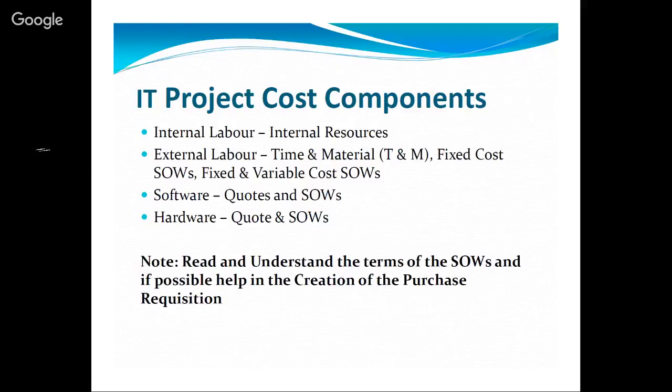So when you take a real estate project, for instance, you will have the cost of acquiring the land, the cost of development itself, the cost of doing the finishes, the cost of marketing and all those components. You need to be able to cost your project and know what it is made up of, and then align the finances. That would determine how you seek the funding from the corporate body. You could go in for the full funding, but ask for tranches or staged capital infusion just to be able to mitigate the fees that you will be paying on that.